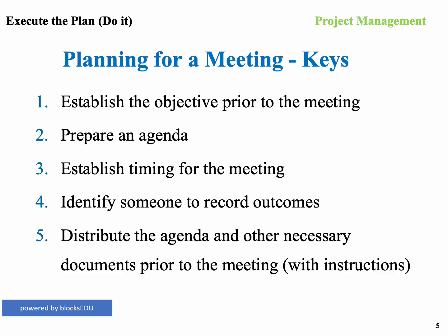Distribute the agenda and other necessary documents prior to the meeting with instructions. Don't just send out an email saying the meeting is going to happen. Send out an email about the meeting, but give them instructions of what they need to do prior to the meeting. Maybe they need to read a document. Maybe they need to be prepared to talk about a particular item. Whenever you invite somebody, tell them what the objective is, tell them why they're there, and tell them what you want them to do prior to the meeting and in the meeting.